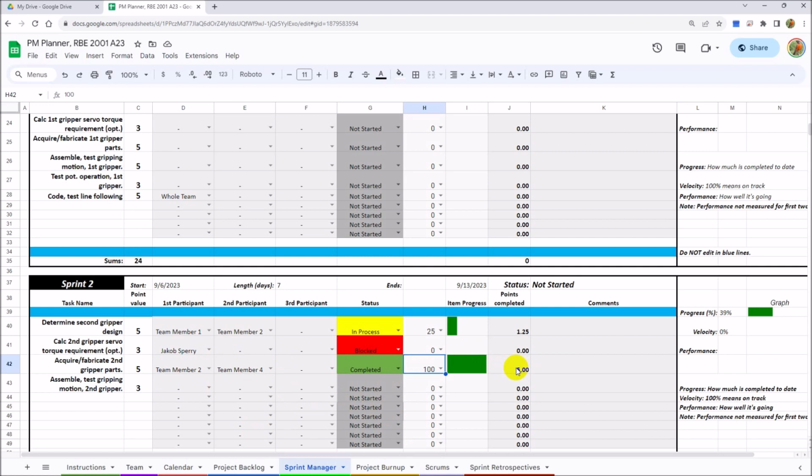So you're starting to see the different things that can occur at a Scrum. Now I'm going to emphasize, the Scrums need to occur multiple times per sprint. I'd say no fewer than 2, more likely 3 or 4, which means you're doing it maybe not every day, but every couple of days during that week.